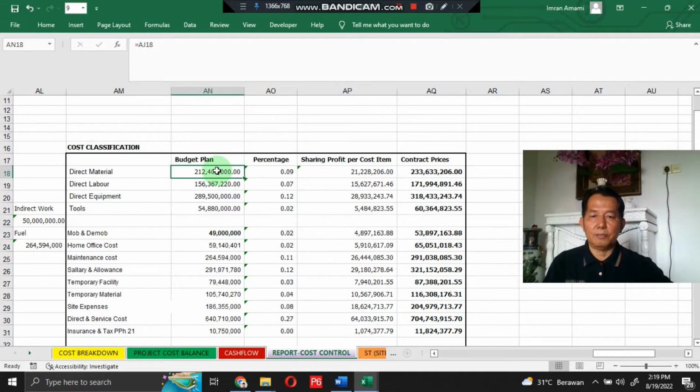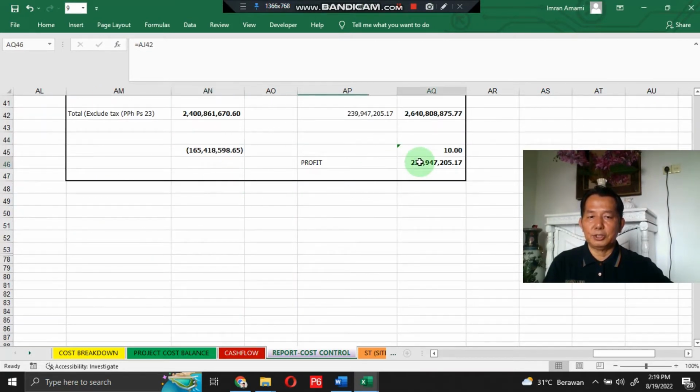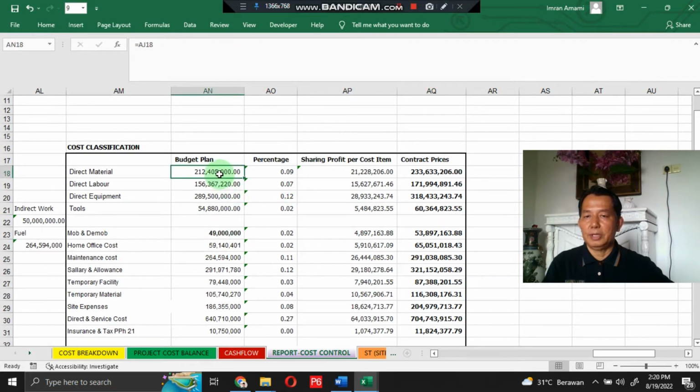I set also a profit for this project. Here it is, profit for this project: 239,947,205.17. This is 10% of total project cost. There is no normative rule to set a profit for projects. It is usually between 10% up to 20%. This is such an attractive bargaining power for the client to set maximum profit.